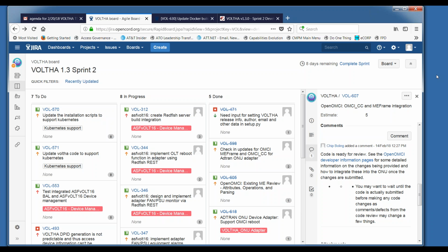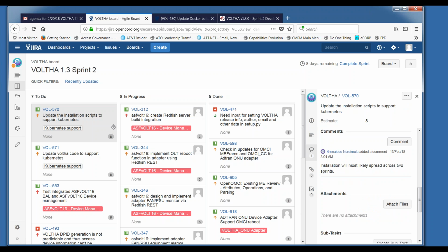The work is ongoing, and I think we'll split that JIRA into 2, because it will be work that will be beyond one sprint. I think we will take 2 sprints to complete that. I saw that in your comments on that. Yeah. Okay. So yeah, that makes sense. Okay. We'll do that, any questions? And then whatever we'll do in this sprint, we'll move that in progress.